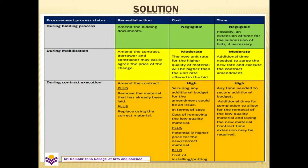The first stage of the procurement process is during the bidding process. We would amend the bidding documents, and the cost would be negligible. Time would also be negligible, with possibly an extension of time for the submission of bids if necessary.